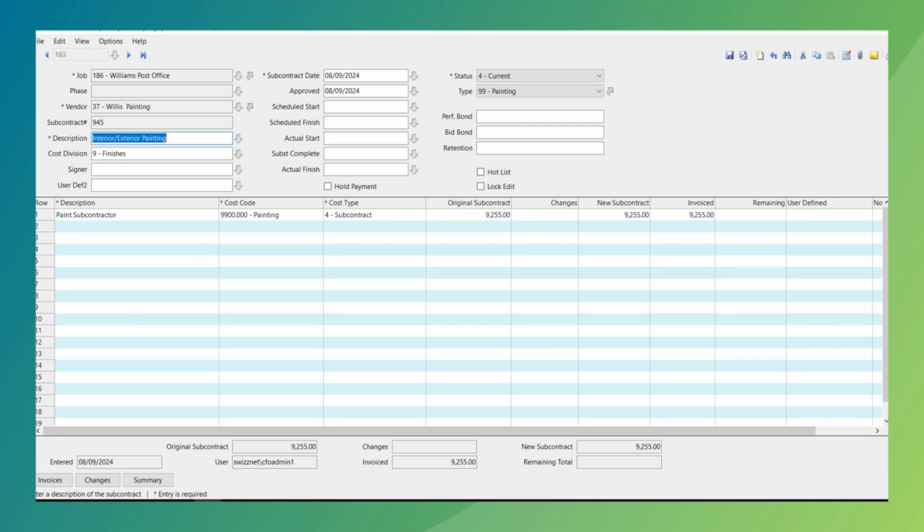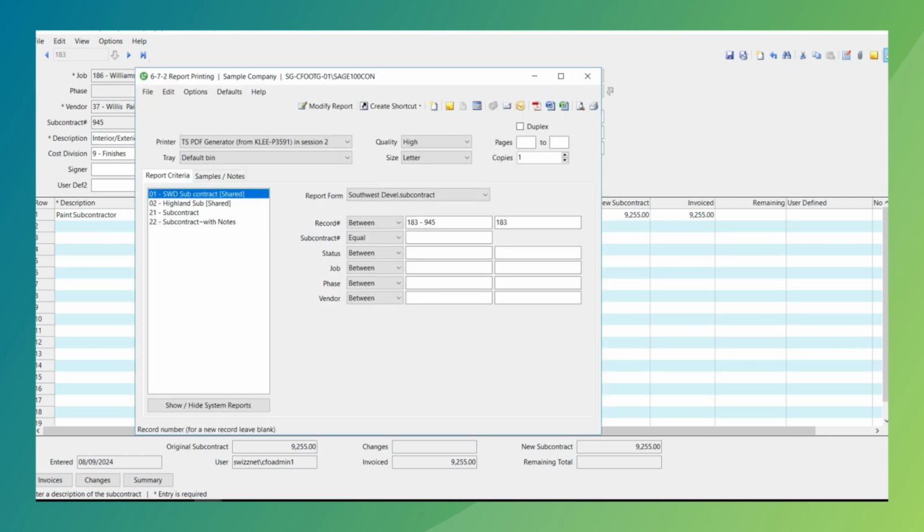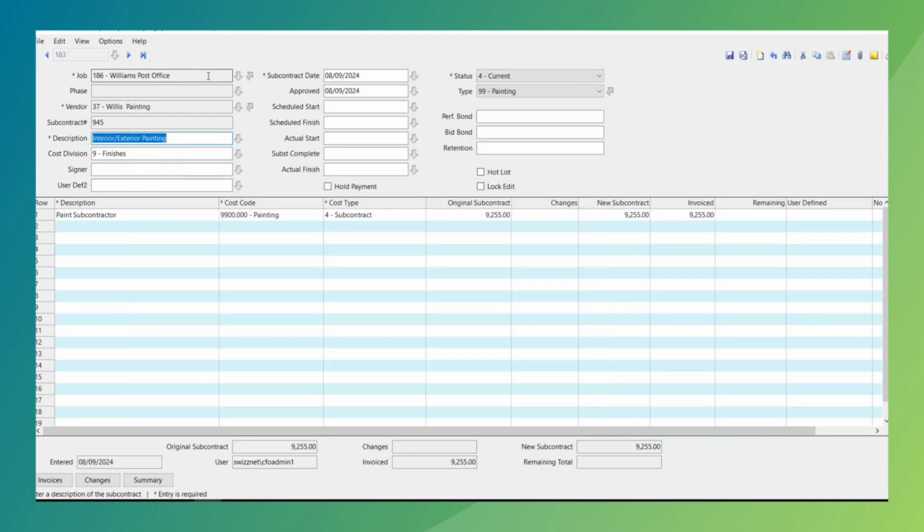Similar to what we have over in our purchase orders, we come out, print custom subcontracts, putting in the language that we need, such as tracking the certificates of insurance: umbrella insurance, work comp insurance, automotive insurance, general liability. Particularly from the subcontract standpoint, a lot of times we do not want to pay a sub if their certificate of insurance is expired.